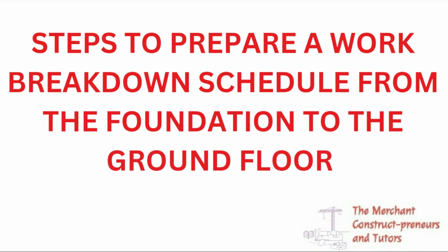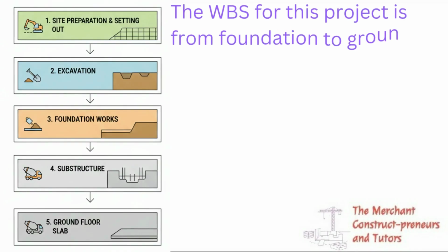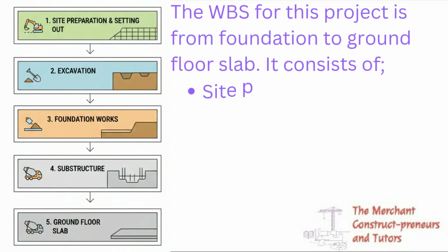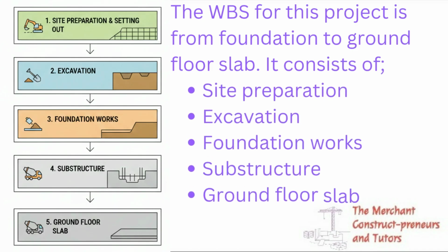Now we're looking at the steps to prepare a work breakdown schedule from foundation to ground floor, step by step. We have the overview, but now I want to go into details of what all these entail. The work breakdown schedule for this project runs from foundation to ground floor slab. It consists of site preparation, excavation, foundation work, substructure, and ground floor slab, just like you can see in the images. We'll be going in depth into each of these activities, some of which will be expanded.